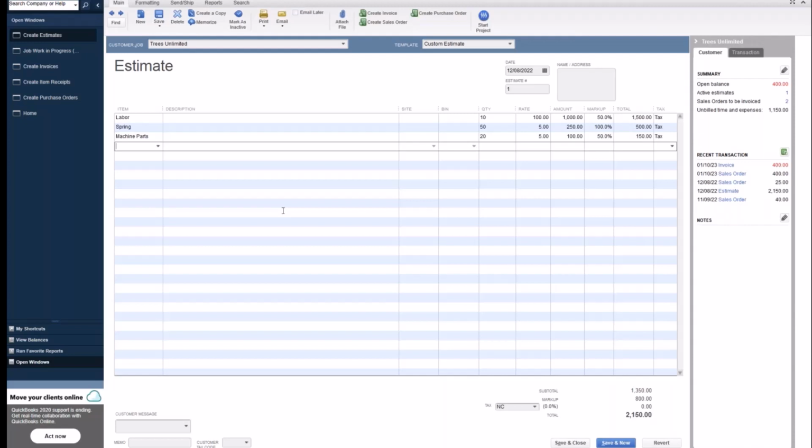So what they did is, whenever we do the over/under billing calculation, we have a separate account on the profit and loss for over/under billing. So now we can see how much that over/under billing account is adjusting your income on your profit and loss, right? Because we do want it regulated. We do want it to be semi-even, but we need to know functionally what it is, and then for the percentage of completion construction method, what it is.